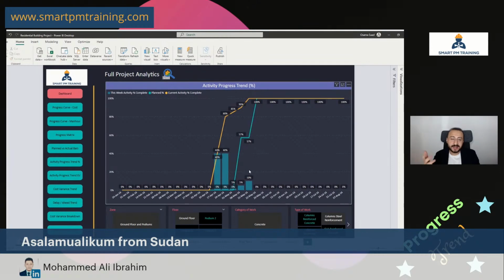Right now you might have delays, and you need 5 additional steel fixers to be deployed right now, but it's going to take 2 weeks, so you will not have a 30% delay anymore. You're going to have maybe 40%, because the slow rate of progress will continue to take place, and you will need even more manpower to account for that delay. So I hope it makes sense.